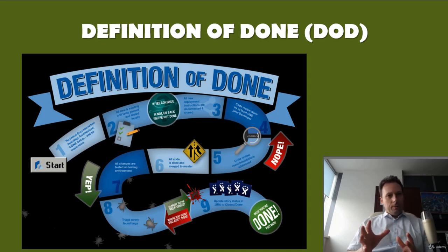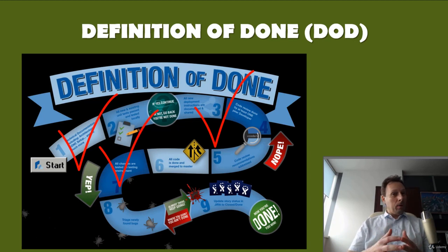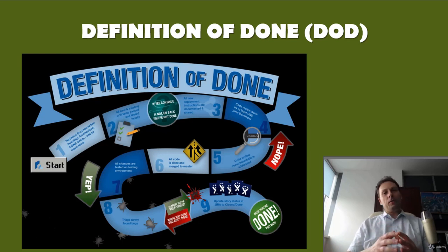Developers have a reputation for being somewhat careless when answering the question, "Are you done with this feature?" The answer to this question usually means done programming, and this is generally what a developer will have in mind when answering. However, the meaning of interest is usually: are you done programming, creating test data, actually testing, ensuring it's deployable, documenting, etc. It all starts with a common vocabulary. If people aren't speaking the same language, there's ample room for confusion, frustration, and mixed signals.